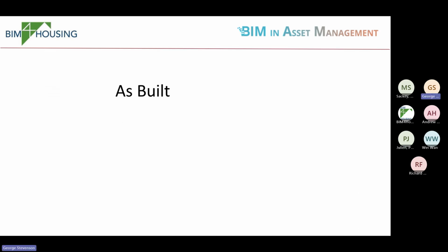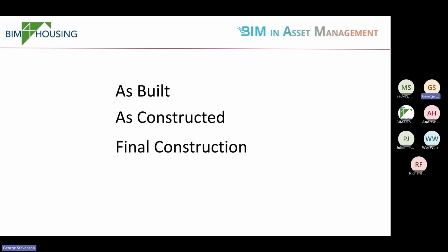Okay. And one of the big challenges that we've got at the moment, I think, is that there's a difference in terminology. There's as-built. Nobody wants to tell you something's as-built now, apparently. So they're using the term as constructed, which is the same thing, really. Also, then final construction. Now, that I think's moving away from something that's more evidence-based. And we're often finding people now saying for construction, which I think is unacceptable. So what we want to be doing as asset managers is push back and say, no, we certainly want at least as constructed.